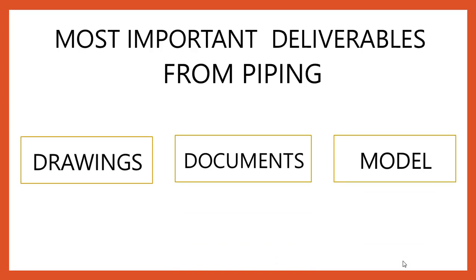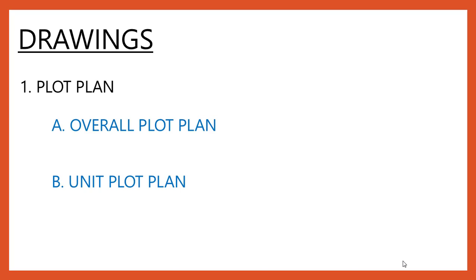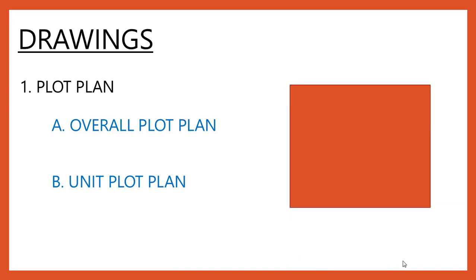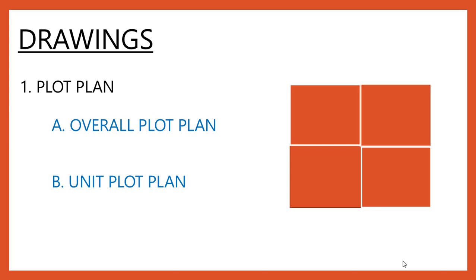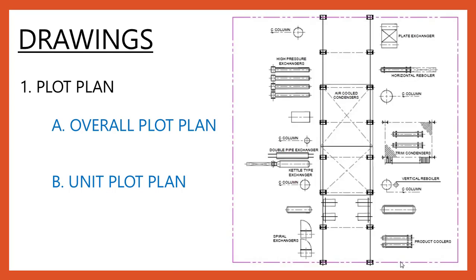Now let's see what are the most important deliverables issued from the piping discipline. These are classified into three types: drawings, documents, and model. Starting with drawings, the first important drawing submitted is the plot plan. There are two types: overall plot plan, which covers the entire plot area, and unit plot plan, which divides the overall plot into multiple segments. The plot plan shows the overall plant with equipment names, positions with respect to coordinates, and primary and secondary pipe racks.